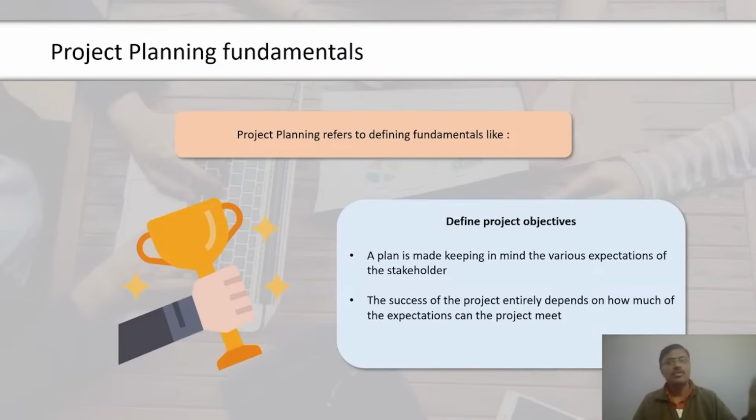Monte Carlo analysis. In this method, a computer simulates the outcomes of a project, making use of randomly generated values that map the probability distribution of the input variables. Together, these 2 techniques are called modeling techniques. Resource optimization techniques. These are also used to produce a resource-limited schedule. Resource optimization results in more stable number of resources used in the project. Critical chain method. This technique develops a project schedule that takes into account both the activity and resource dependencies.